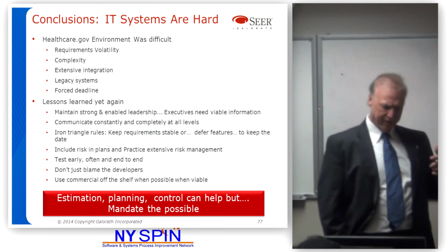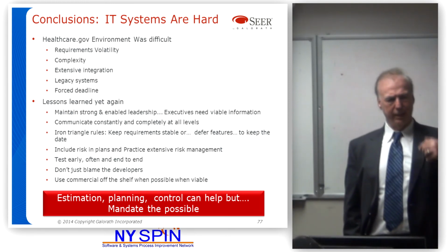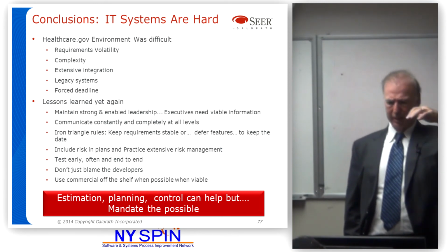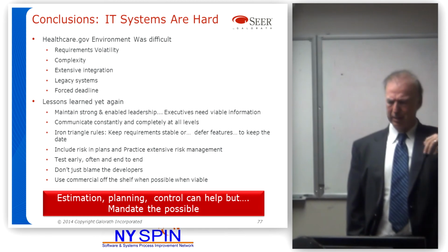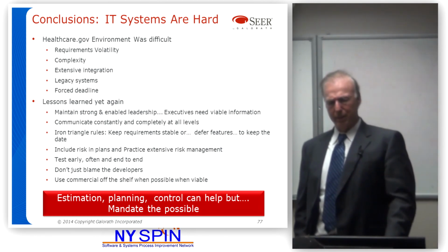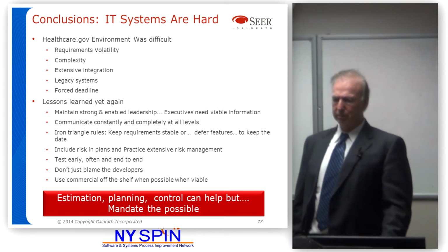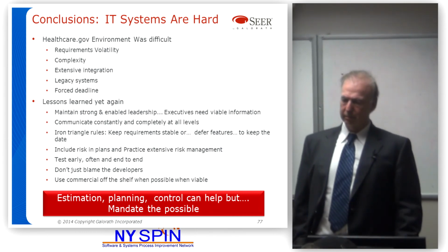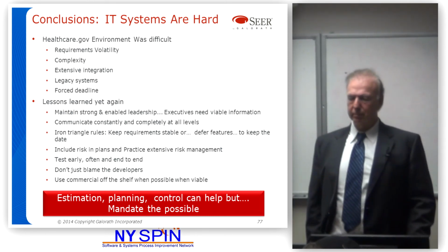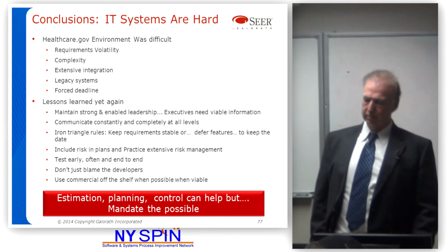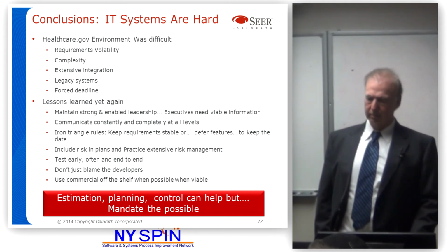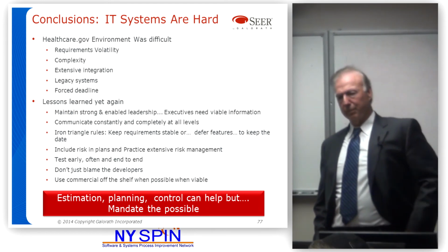Absolutely. Our SEER model actually even has a parameter called resource and support availability. I don't remember the sensitivity of it, but if you email me, I can tell you. It's a 20, 30, 40% difference on the project depending on how available resources are. If you take that a step farther, you're also talking about junior people versus senior people, people who may not have done that type of project before, even though they may be senior. All that adds to the risk or decreases the risk.